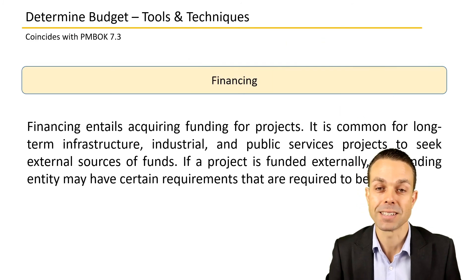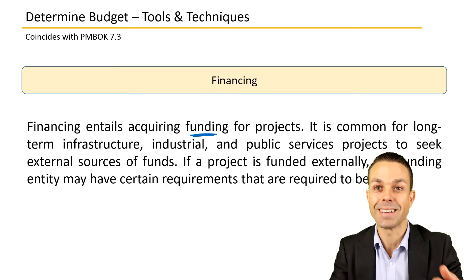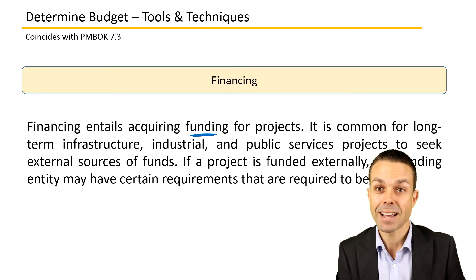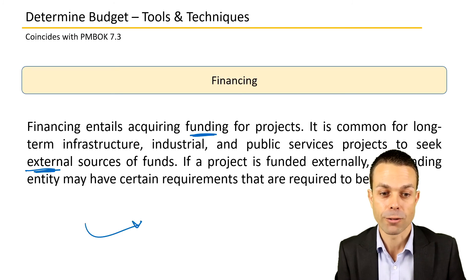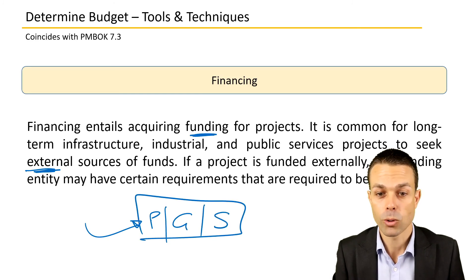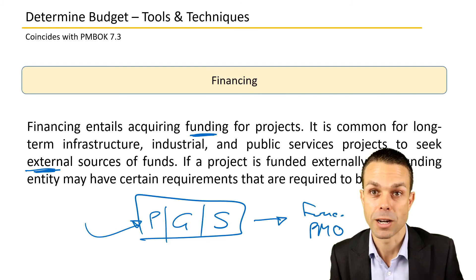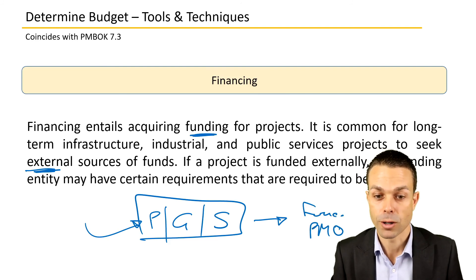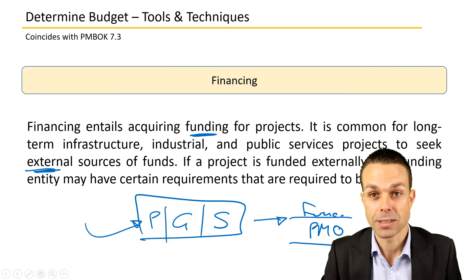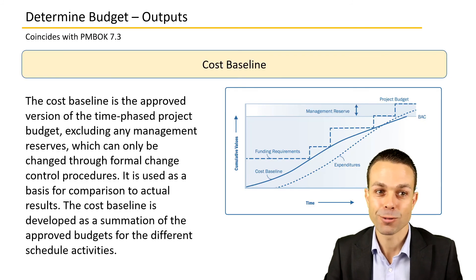Financing is also an important tool and technique — it entails acquiring funding for the project. It's common for long-term infrastructure, industrial, and public services projects to seek external sources of funds, such as the public, government, or shareholders. Within an organization, funding may come from a functional area, the project management office, or other internal parts of the organization. The funding entity may have certain requirements that need to be met, and we need to be aware of those.